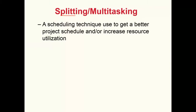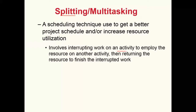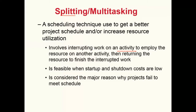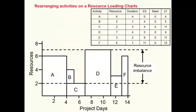Another key technique in resource management is activity splitting or multitasking — a scheduling technique used to improve the project schedule and increase resource utilization. It involves interrupting work on an activity to employ the resource on another activity, then returning to finish the interrupted work. It is feasible when startup and shutdown costs are low, but is considered a major reason why projects fail to meet schedule. In the resource histogram example, there is a trough halfway through the project which can be addressed through such techniques.